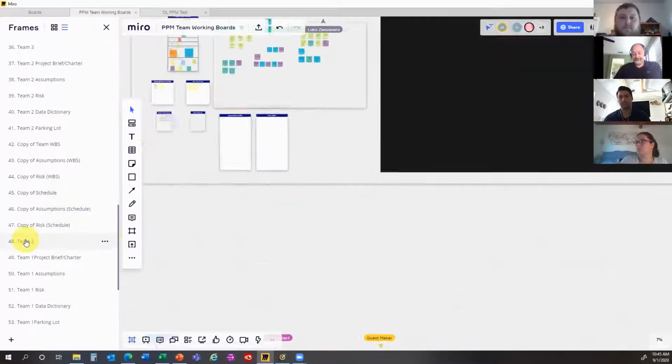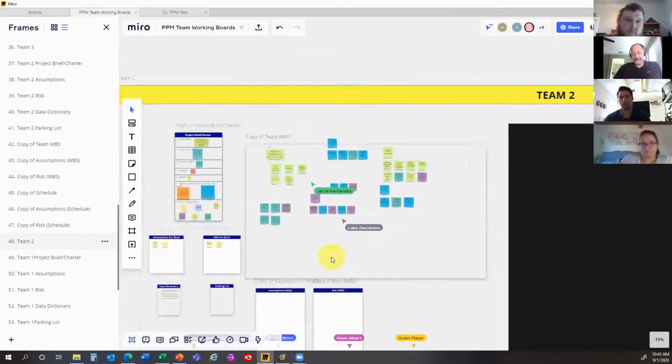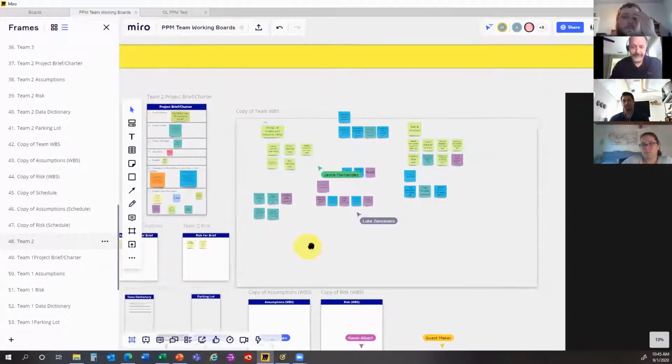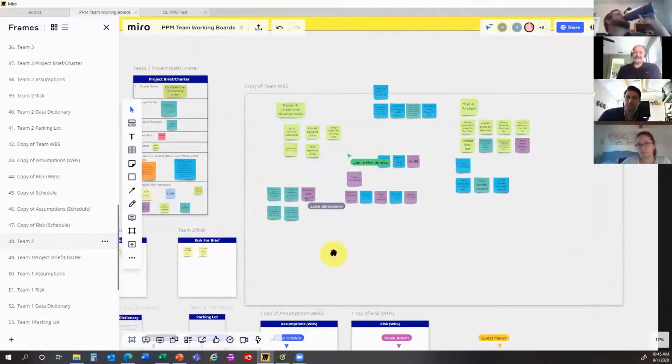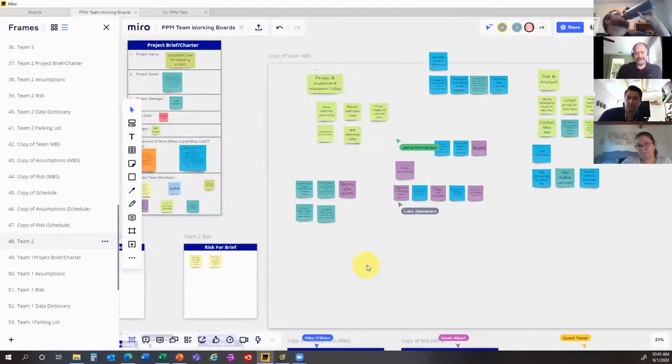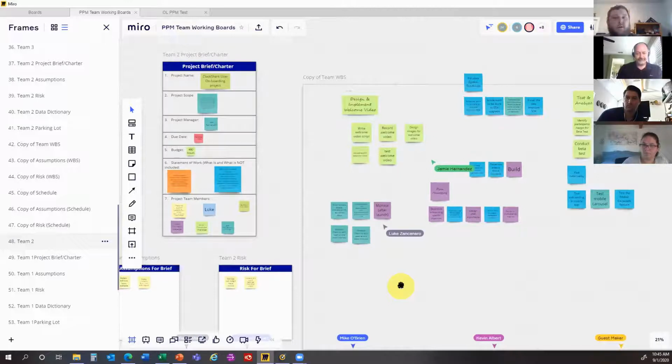I think the only comment that I have, a question, I know they're in a similar business as us, so harvest is coming up. Are you going to work around the harvest schedule? Is that in the back of your mind? Is this going to be after harvest? So we set ourselves a 3-month timeline, and our harvest is scheduled for 6 weeks. So we could be doing some underground work while the harvest is happening, but weather permitting, we can do this all after harvest. Okay.